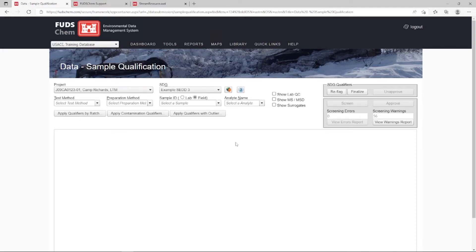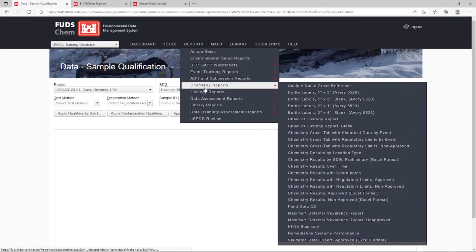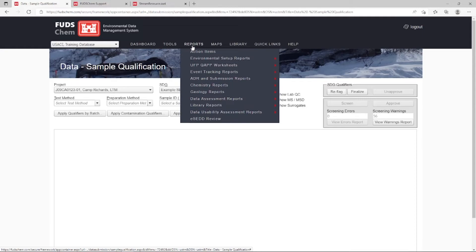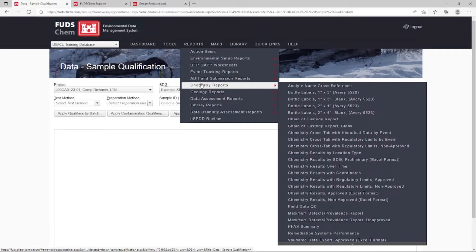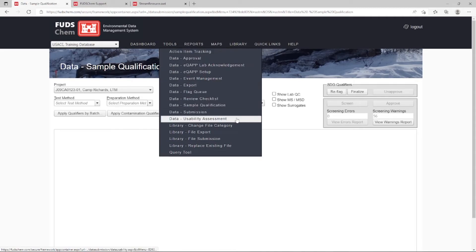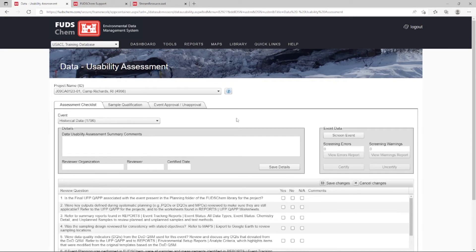Once validation is finalized, data should be approved by the core chemist within 60 days of sampling ending. Approved data can be viewed in final reports and spatial systems such as Google Earth. Please refer to our Chemistry Data Approval Tutorial for more information on approving chemistry data. Once all data in an event is approved, it is ready for a Data Usability Assessment. Please refer to our Data Usability Assessment Tutorial and Data Usability Assessment Reports Overview for more information.